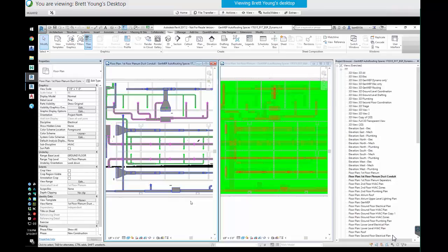The importance of what this is, though, is that what you're looking at is the beginning of machine learning applied to clash detection. With clash detection, we're getting too many clashes, and we need to prioritize them. One of the ways we can prioritize clashes really well is that clashes happening in a high congestion area are a higher priority because they're harder to fix. By doing this type of work and coming up with a complexity, we can prioritize clashes in an algorithmic and computational way, as opposed to the way we currently do it, which is by our discretion. So that's why we're working on this.